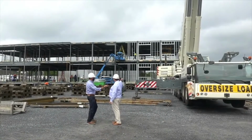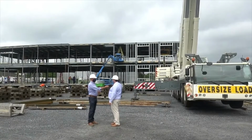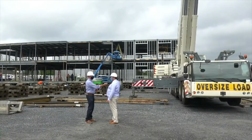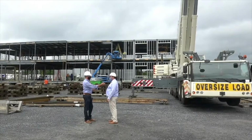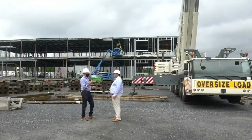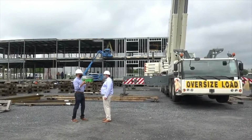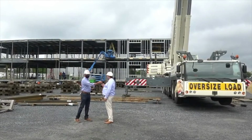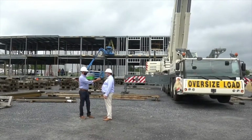Yeah, they are. So we're starting exterior wall framing. We're going to get this building completely dried in. Once it's dried in, that's when we'll start our MEP installation. So we're focusing on the exterior walls right now, and then we'll put on a roof, and it'll turn into a dried in building. Right. And I think it's fabulous, because how easy is this to lay out all of your subcontractors in one spot? It's just a repetitive step and repeat system for you by having a controlled environment like this. Yeah, that is correct. And as you mentioned, we use licensed subcontractors for all of our MEPs.